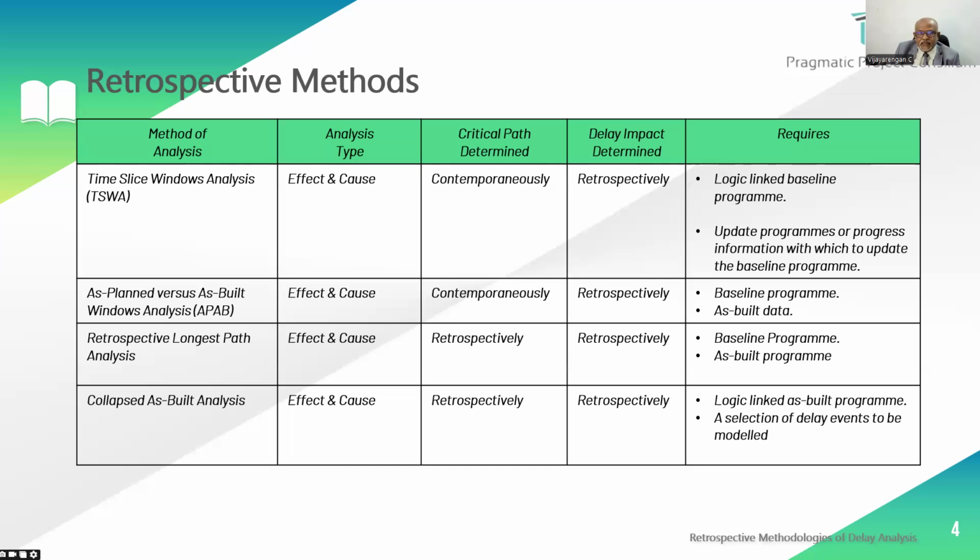For example, the plant needs to go for a shutdown, and they usually create shutdown windows, and within the stipulated time frame they have to finish the work they have awarded. It is very important to maintain the dates. They are working up to level 5, level 6, depending on the plant requirement. So every hour is counted.